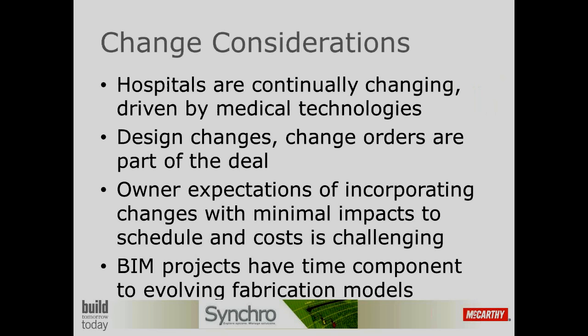I know HP projects are a little bit different. They don't change. But on our projects, we have lots of changes. For here, just the hospital building alone, we've got 320-something IVs already, or ACDs as they're called now. And that's just one building alone. It's to be expected, and you should plan for those changes. How you're dealing with those changes throughout the course of construction is really important.